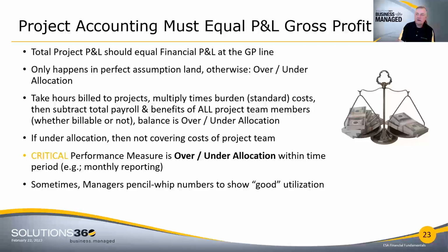Sometimes when I start lecturing on utilization, managers start pencil whipping their forms to show everybody's got great utilization. The problem with that, of course, is I'm not generating productivity for the labor hours that I'm applying to jobs. And so you have to have integrity in reporting, and managers have to be committed to reporting actual hours to the projects they're working on, and not play games and say, well, this project's over budget, so I'm not going to record time. Instead, I'll record time to this other project. You'll never understand where your money losers and makers are if you start playing games. Just be real with yourself and show actual.